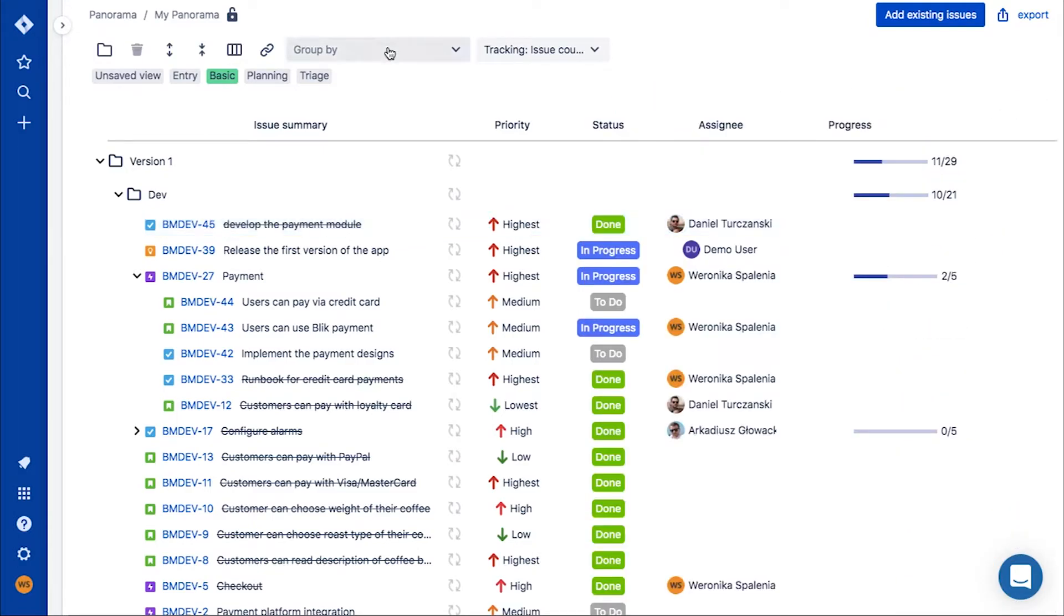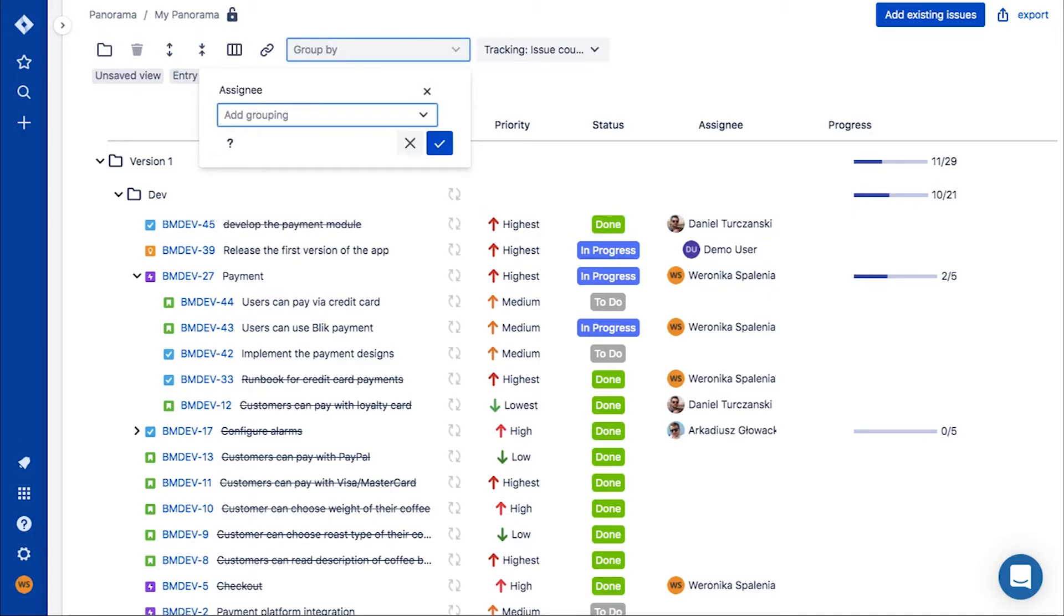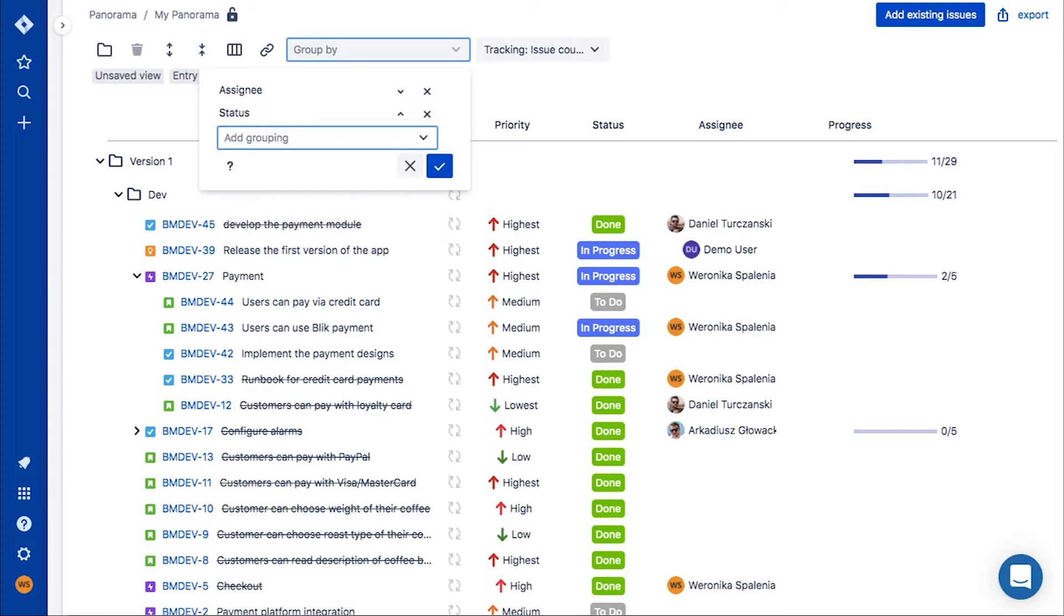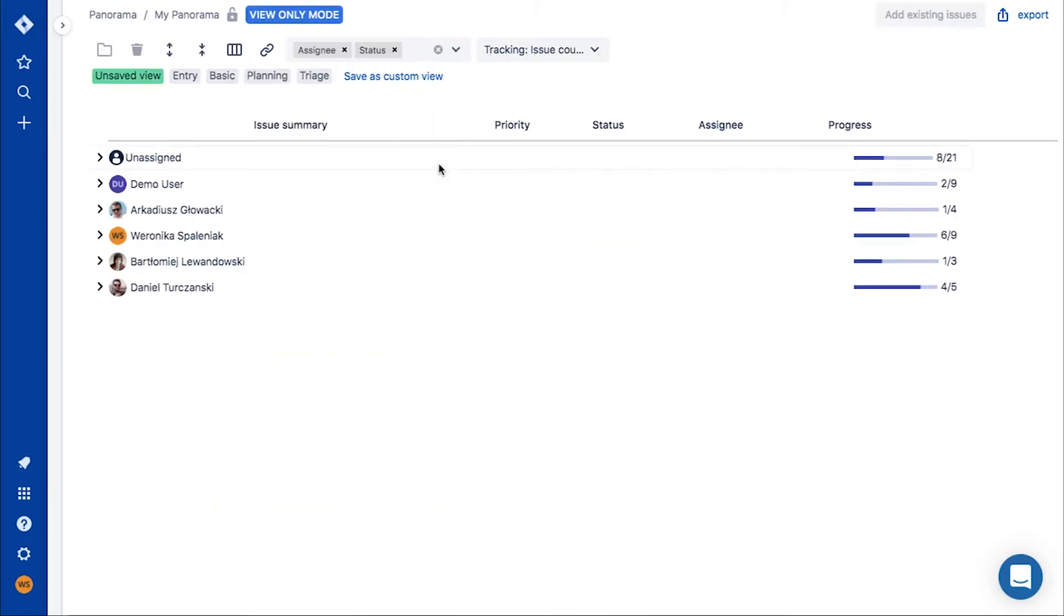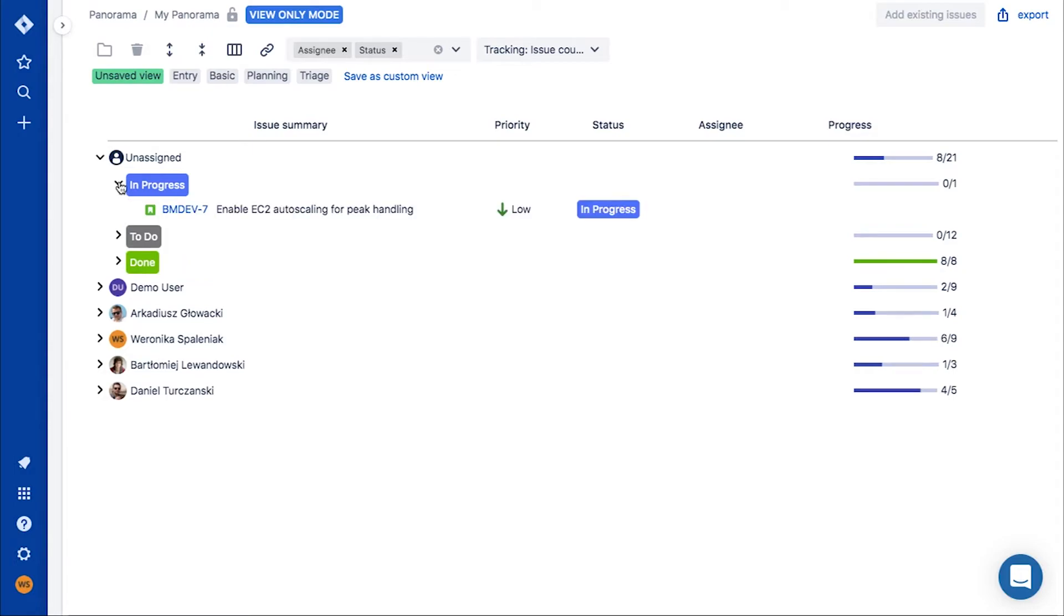To get an even better overview of your work, you can use a grouping functionality. If you want to check the progress of the issues of each person working on your product, just group them by the assignee and status.